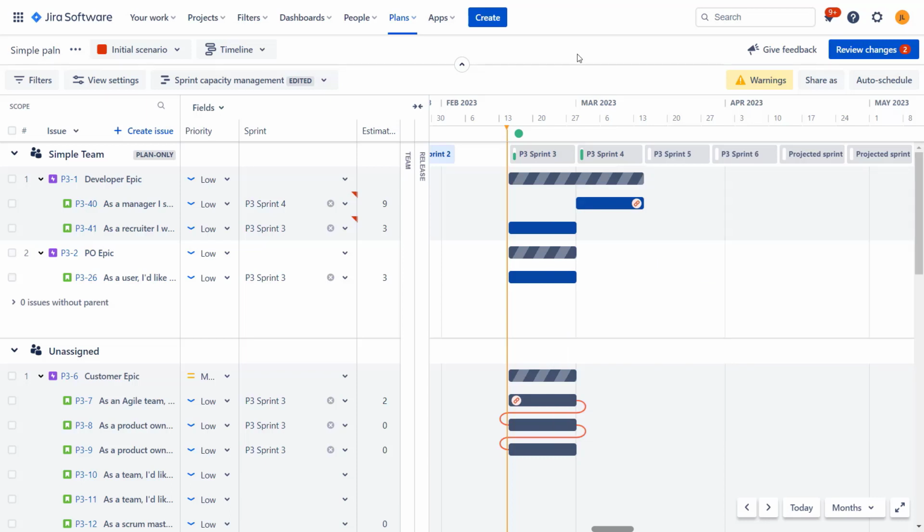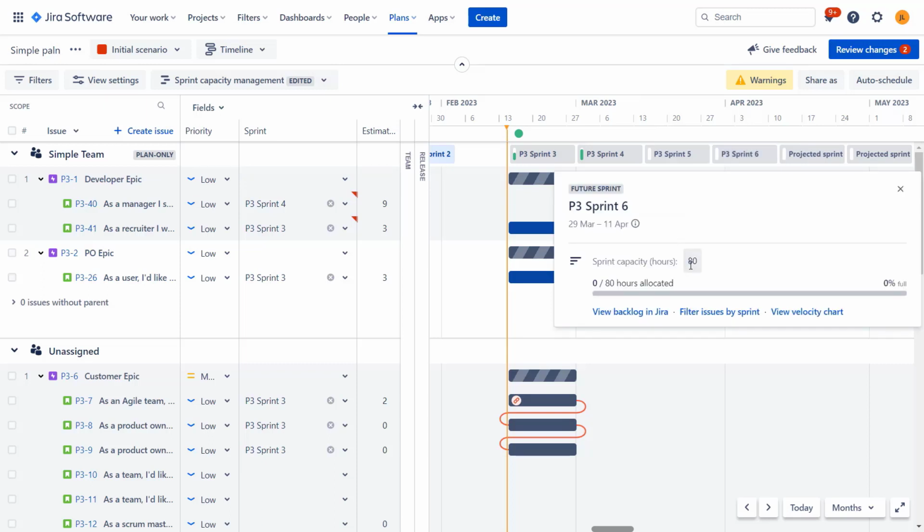But you need to remember, I've seen cases where someone got their holidays approved 5 months ago. Someone updated the sprint values and later the sprint came closer to being started and no one really remembered whether this holiday was actually already included in the changed capacity or not. So you will have to set up a process that will take care of not having doubled holidays over here, or you will just have to keep on checking this. So it's simple, but it works.